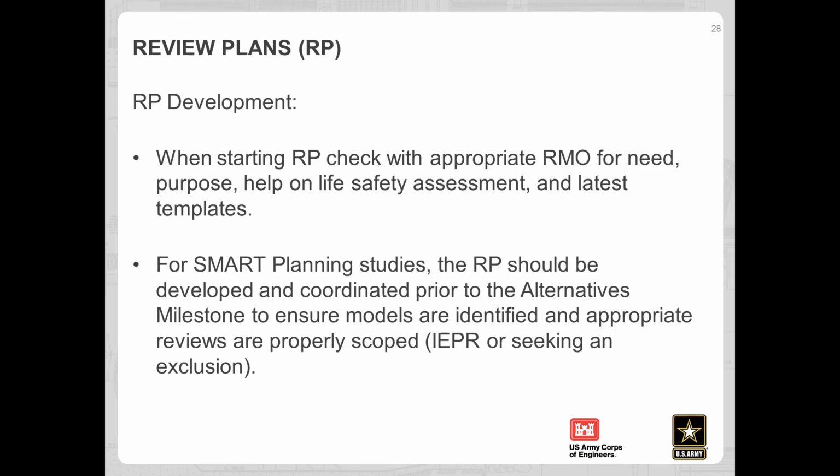So there could be a question, who's your RMO? Starting early and asking that question and figuring that out is a good thing to do. We're looking at having, as soon as you sign your FCSA for a study, you're not going to have your reviews all fleshed out, but by the time you get to the alternatives milestone, you're going to have a good idea of what you're looking at for the review of the draft report after your TSP.